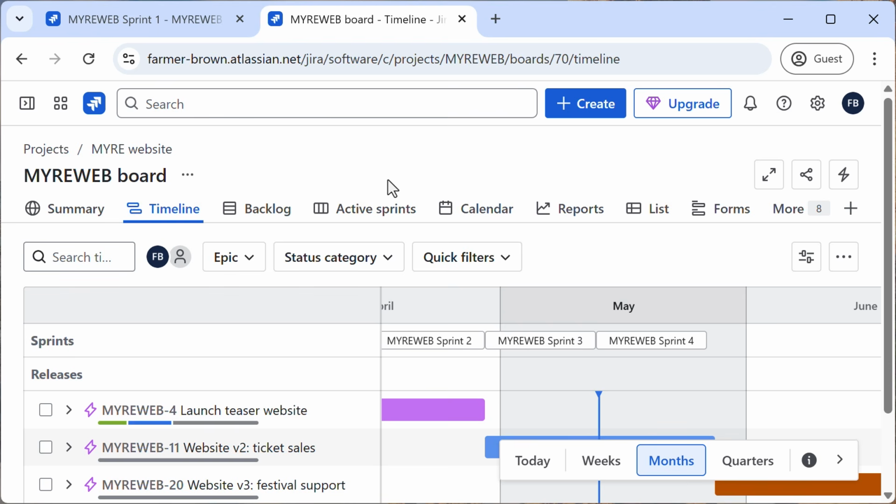So roadmaps, or timelines, help with high-level planning across weeks or months. Use them to manage epics and communicate timelines. They're ideal for keeping stakeholders aligned. But also remember, the less critical something is right now, the harder it is to predict exactly when it will be completed. The timeline is great for high-level planning, but remember to stay flexible and adapt to shifting priorities.